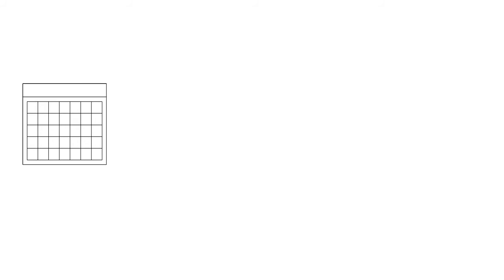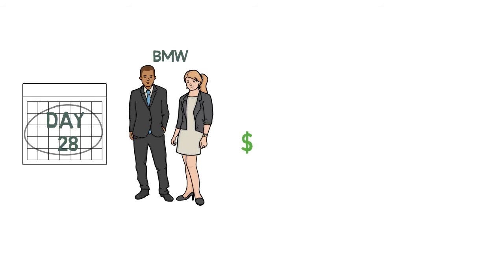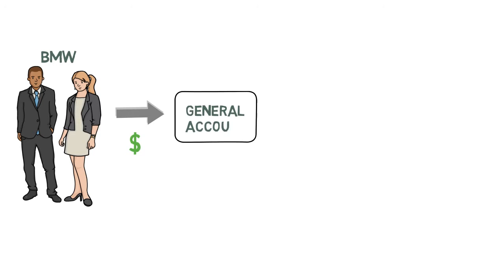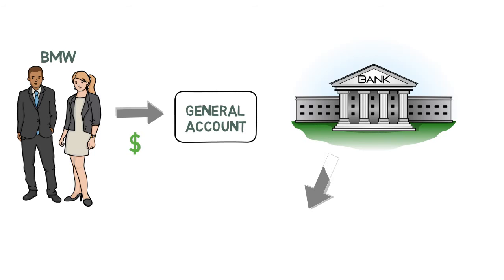By day 28, BMW will pay the amount certified into the general account and the bank will distribute the funds in accordance with the progress payment instruction.